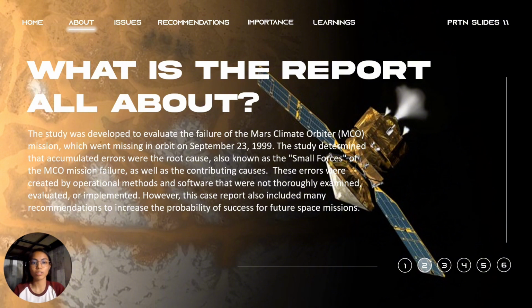What is the report all about? On November 10, 1999, the Mars Climate Orbiter Mission Investigation Board issued its Phase 1 report. The study was developed to evaluate the failure of the Mars Climate Orbiter mission, which went missing in orbit on September 23, 1999. The study determined that accumulated errors, also known as the small forces, were the root cause, as well as the contributing causes. These errors were created by operational methods and software that were not thoroughly examined, evaluated, or implemented. However, this case report also included many recommendations to increase the probability of success for future space missions.